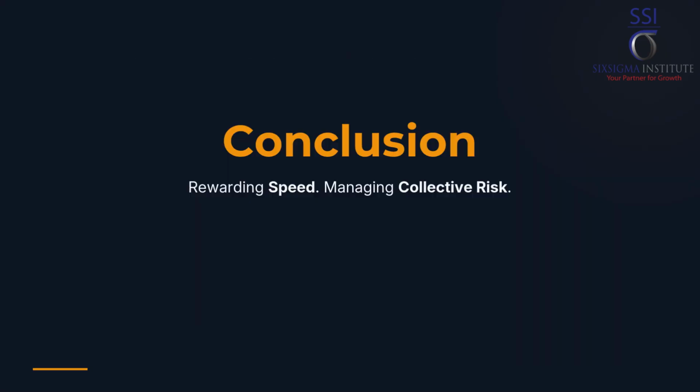In essence, CCPM shifts project management from a system that rewards padding and punishes early completion, to a system that rewards speed and manages collective risk through transparent buffer monitoring. Stop padding, start pooling. CCPM focuses execution on the critical chain and manages risk proactively via buffers.